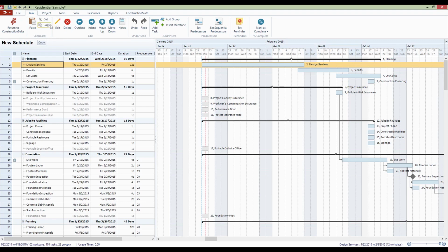Now, the templates that we're setting up are typically going to be a collection of groups and tasks that are all associated by predecessor relationships. Over a standard schedule, your template might have all of the durations set as well. And then as you scroll down, you'll actually see where I've started linking some of these tasks together to build what I would imagine a standard schedule would look like, assuming that we started this job today.